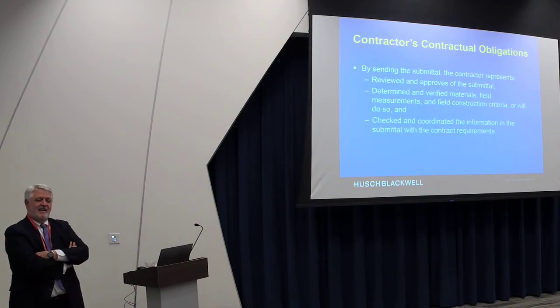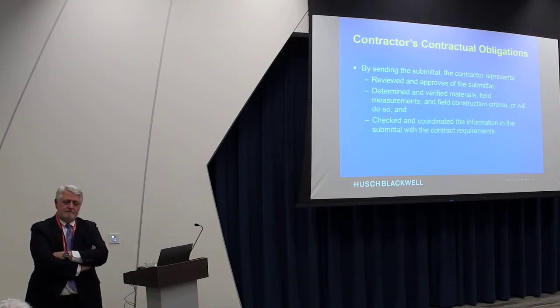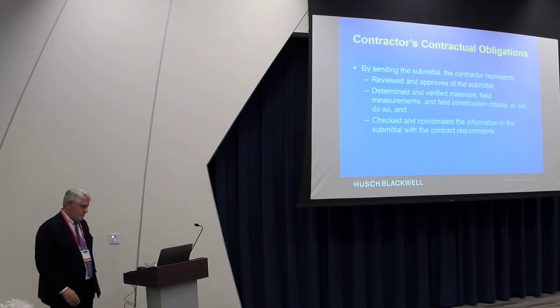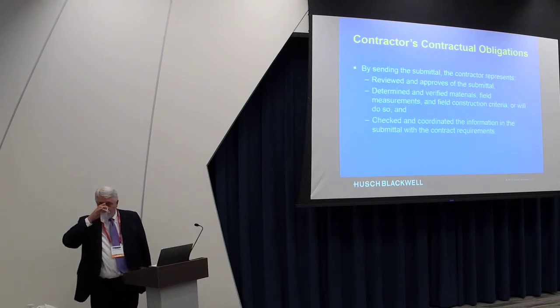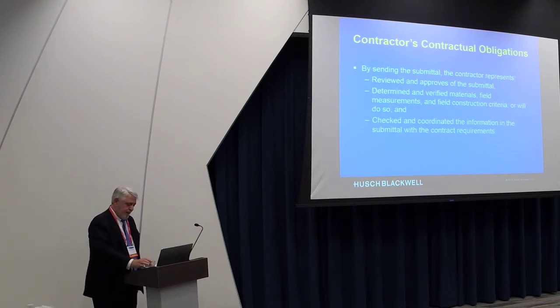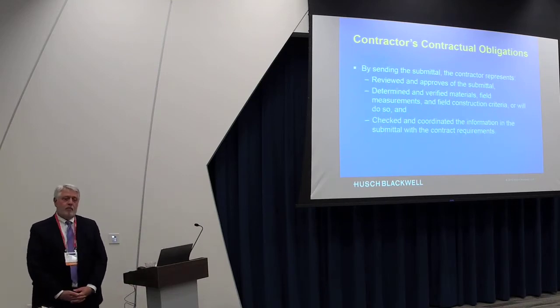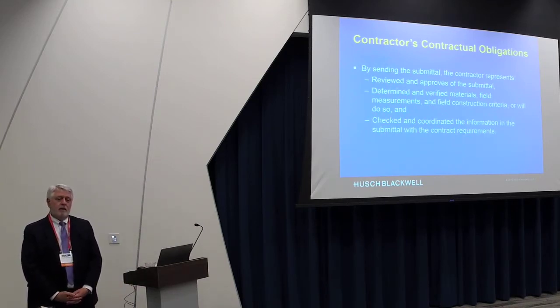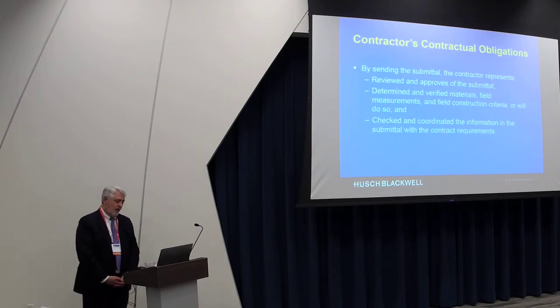When it comes down to it, I as an architect do not have a contract with the contractor in the traditional design-bid-build. In enforcing the contractor's terms in their agreement with the owner, I have no real leverage. I can point out to the owner that procedures aren't being followed and that there's a potential liability exposure there for the owner. But at the end of the day, if the owner doesn't make the contractor do what's in their contract, I don't have a lot to say about it.